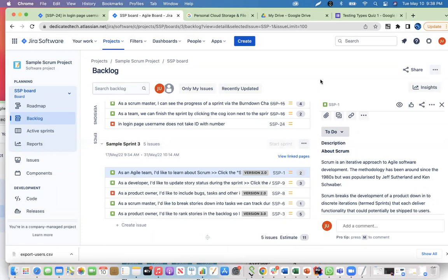I'm just going to say 5 points. I agree with him, 5 points. And it's going to go like that all the time. So that kind of removes the reason why we even estimate, right? Otherwise we can just have one person estimate everything, right? So that's why we don't want to reveal the point until everybody points it.